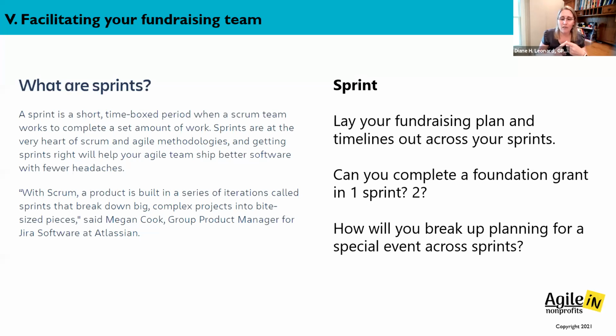A grant narrative draft, or an appeal letter, or an annual report, or some other sort of graphic that you were creating for an event? I know I've done it before. Oh my gosh, with grant applications, I'm like, but I don't want to let you see it yet because it's not perfect. Had to let that one go. So the point of sprints is to make them as short as possible so we can create something of value that we'll get feedback on and then continue to iterate.